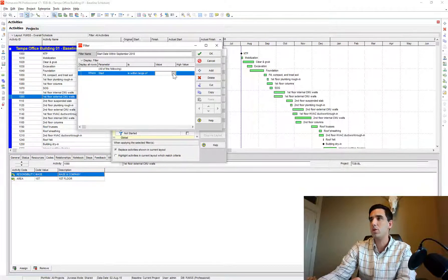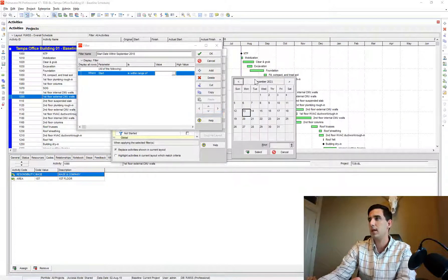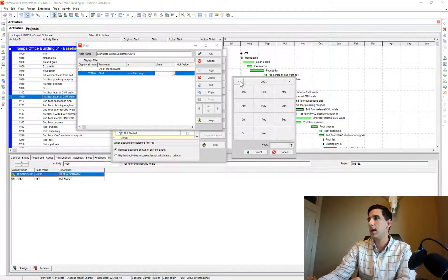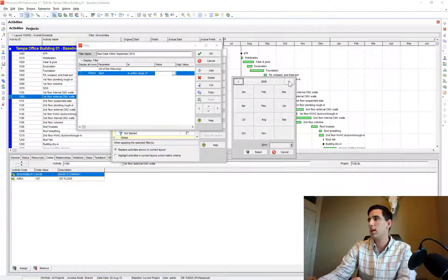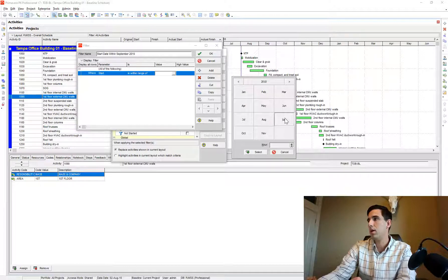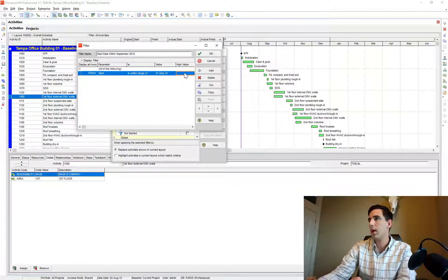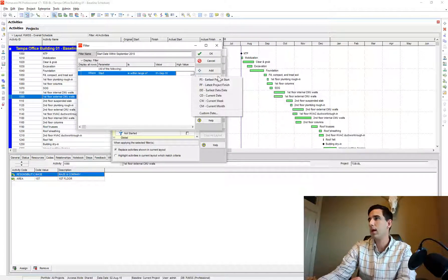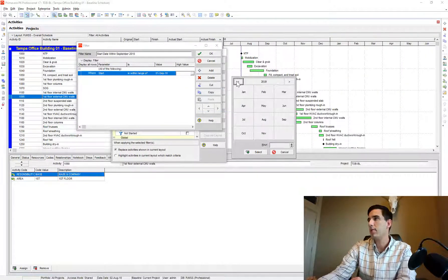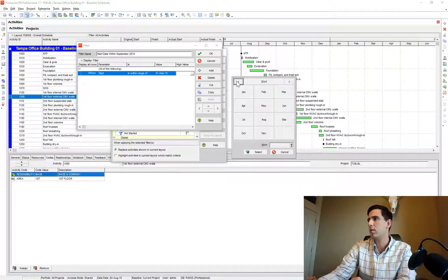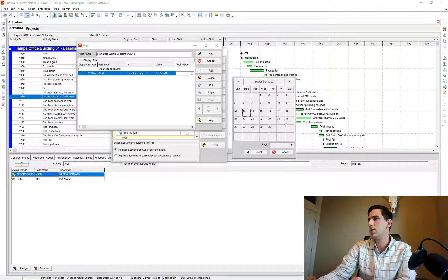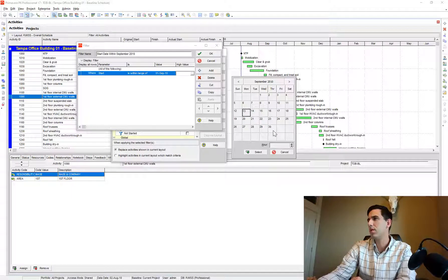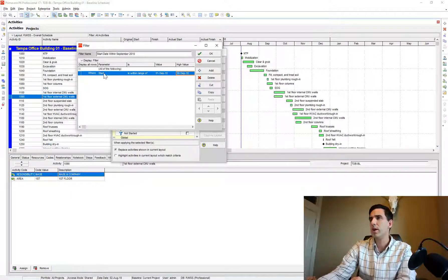I'm going to be able to choose a low value here, so I'll say custom date and I can choose it's within range of September 1st. And I want a high range of, going to 2010 here, of the high range is September 30th.